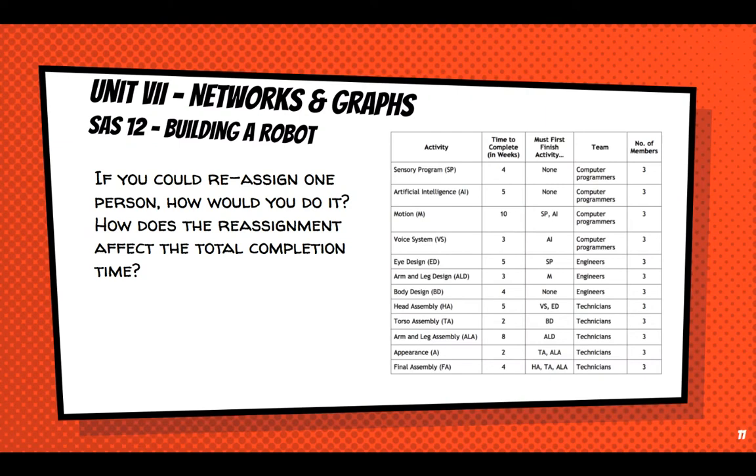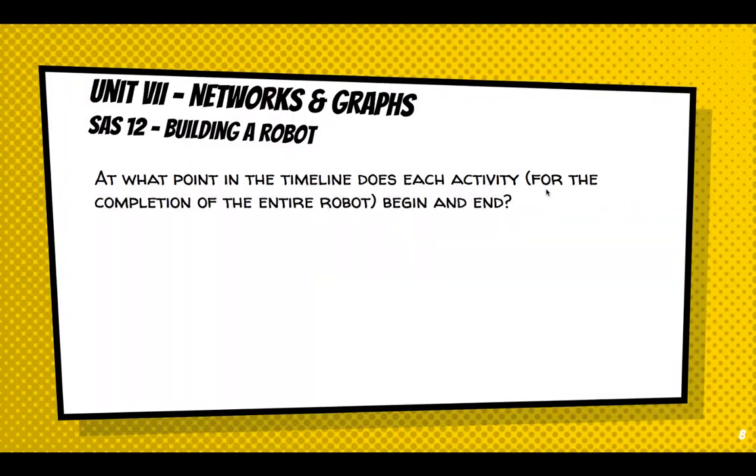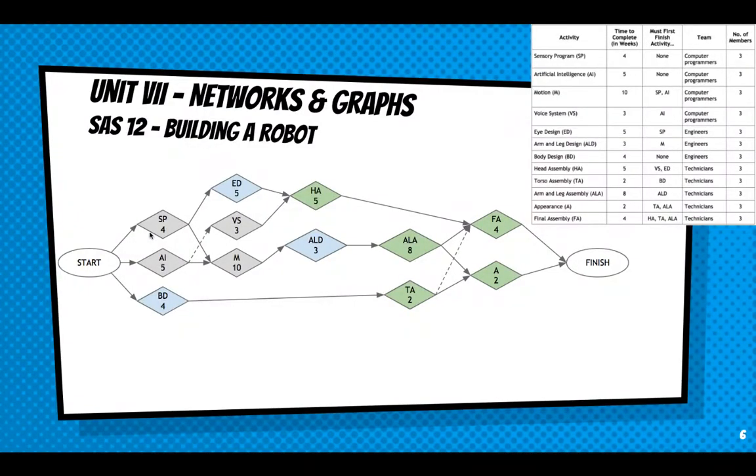So if you could reassign one person, how would you do it? And how does the reassignment affect the total completion time? Well, one of the things they didn't give us here in parameter size is how many in each team? If we start with three, we're going to be waiting a long time. Because if you go back to the actual activity graph, right off, right off the bat, we need three activity or three computer programmers in sensory program, and three in AI. So we would need at least six to get started. And then on engineering, we would need three more. Okay. Which is cool. If you think about this, you would only need three engineers, depending on how well you could distribute the different people. But you would need at least six computer programmers to start.